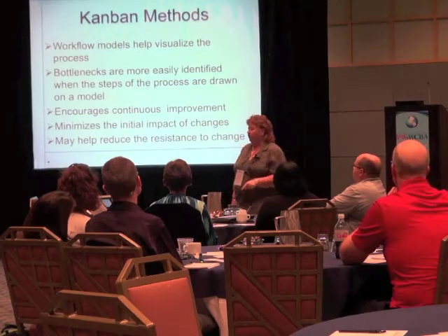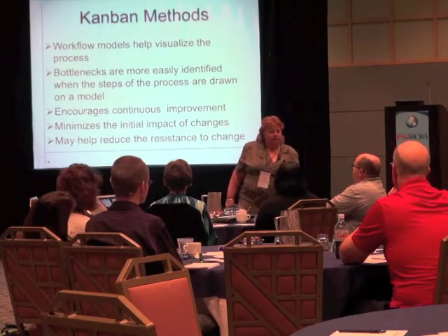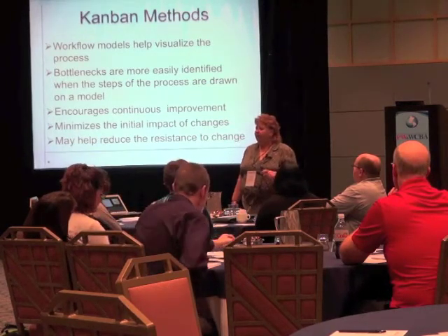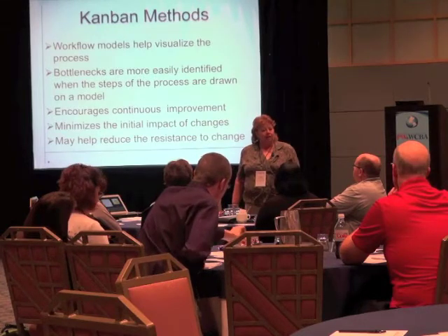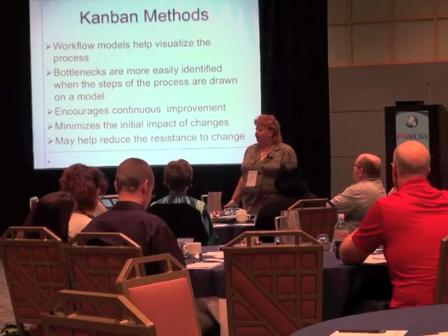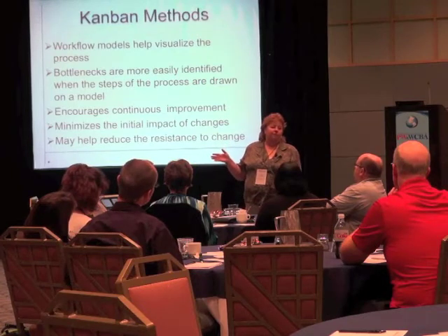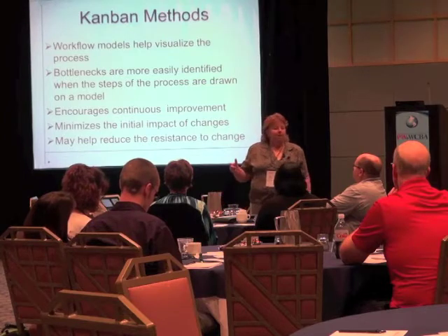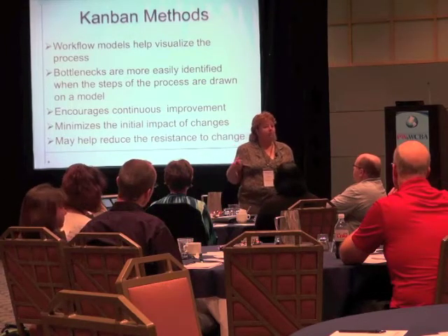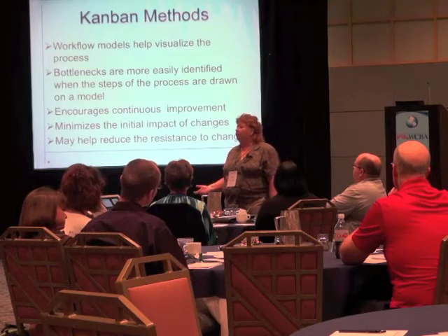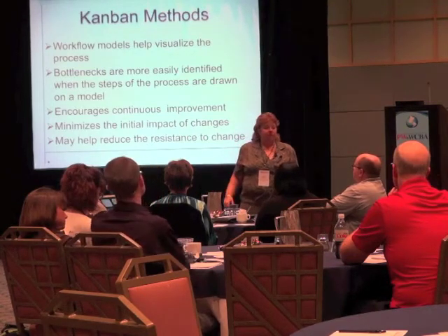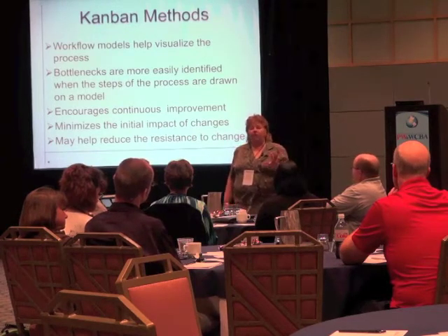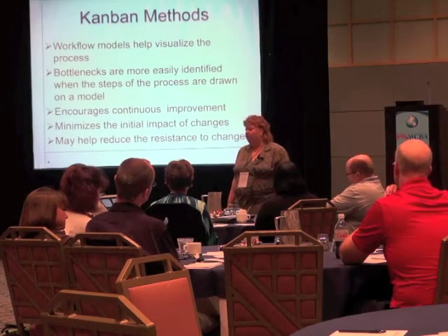So what we did then, we found over time that talking about these changes in a 5 to 15 minute increment was great day to day, but guess what? Every now and then they felt like there was some elephant in the room that no one brought up because we couldn't talk about it in 15 minutes, much less that they wanted to say it where the whole world could hear them. And we implemented retrospectives monthly that were much more formal to give them that second view of the world. Or if someone said, we need to talk about this in a closed space, right? We would just get together, talk about what was wrong, talk about what needed to be fixed.